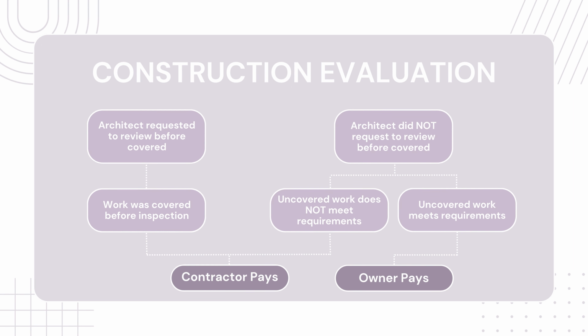Now, there is another scenario where the architect could have told the contractor, I want to inspect this work before you cover it. At that point, the contractor must notify the architect to review this work before it gets covered. If the contractor goes ahead and covers up that work and never notifies the architect, the costs are then the responsibility of the contractor.